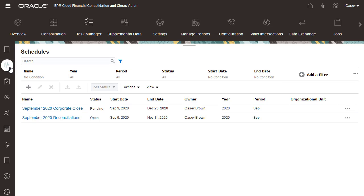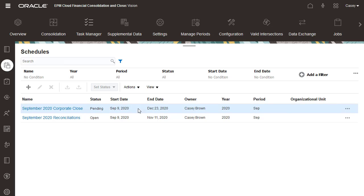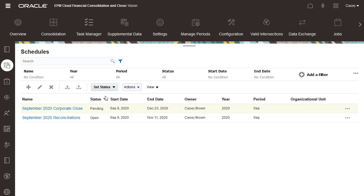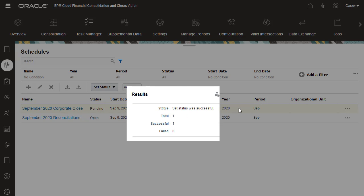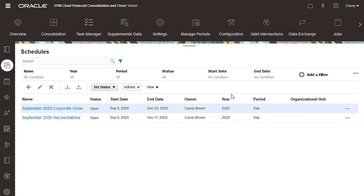The Initial Schedule Status is Pending. All tasks in the schedule are pending until you change the schedule status to Open. When you change the status to Open, tasks that have met their start date and whose predecessor conditions have been met are changed to Open with an assignee. Email notifications are sent to the task assignees.